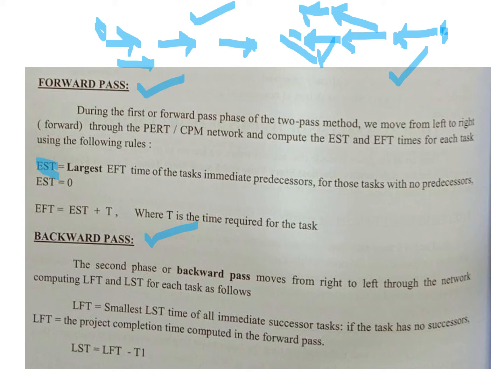So the earliest start time is essentially the largest earliest finishing time of the previous predecessors.